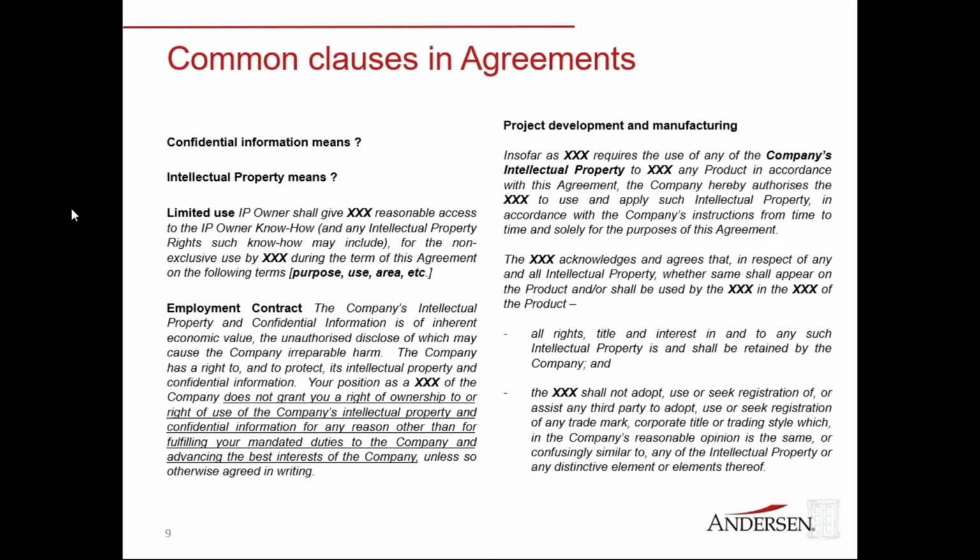My last point on this topic is that one should also consider the dispute resolution process very carefully and how this should be dealt with in an agreement. One of the biggest mistakes that we see is people using dispute resolution arbitration clauses in agreements that are very general, without giving consideration to the parties' contract and their respective locations, the subject matter of the agreement. I think some people may think that it's not an important clause when they're trying to close a deal, but I can assure you that is a decision you may live to regret if a dispute arises and you are bound by that process.